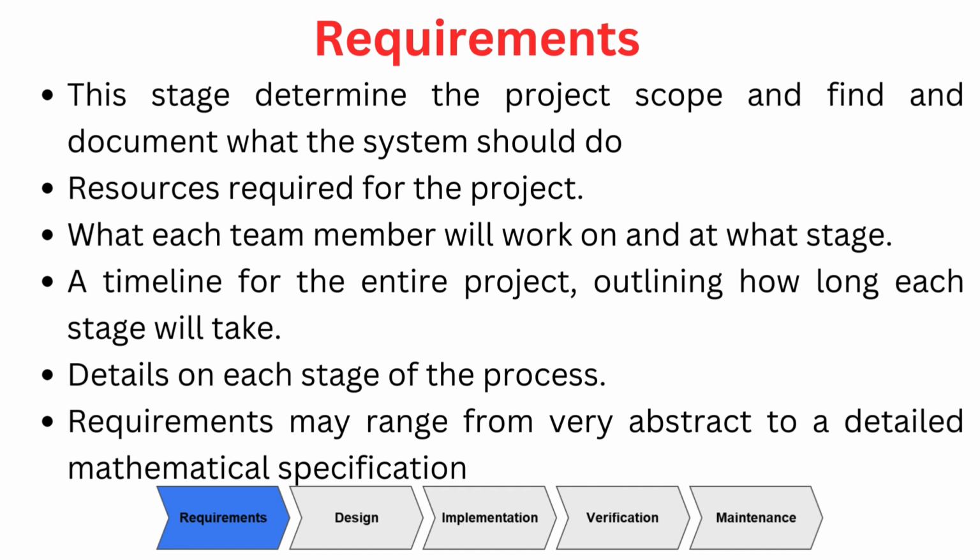It's a document that contains details of the requirements, the screen designs, explanations of each input field, report layout, explaining each report field, user flows, menus, different user roles or personas, and everything. So usually the project team will request the customer to review and sign off the SRS before they move to the next stage, so that they are fully confident the requirements are confirmed by the customer and they can start their development work.